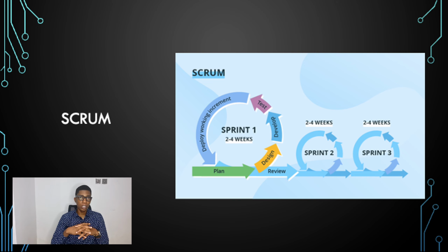Scrum is done in sprints. The work is done in sprints, and a sprint can typically last around 2 weeks to 4 weeks. They are preceded by thorough planning and previous sprint assessments. No changes are allowed after the sprint activities have been defined.